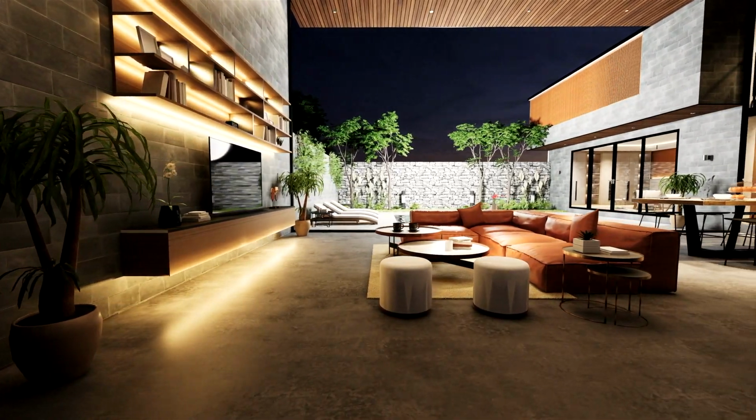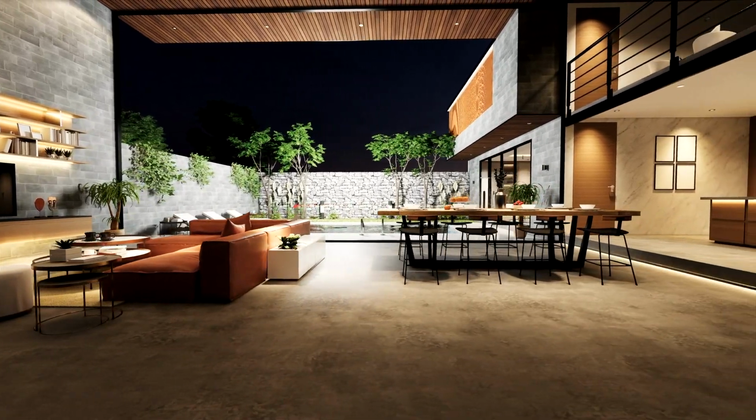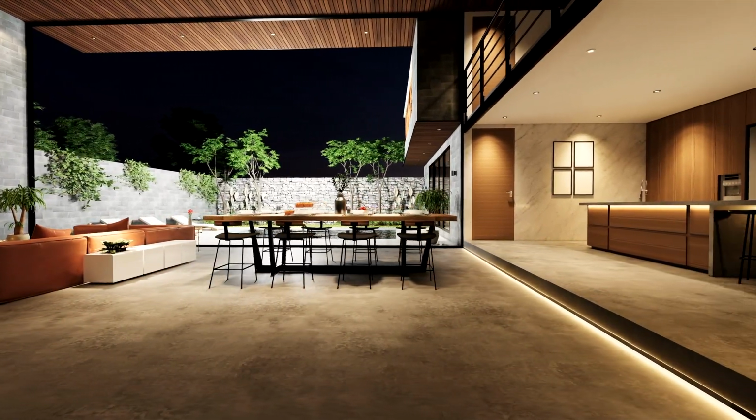Typically, a budget was never set. A curious homeowner simply asked a designer to show them what's possible based on what they want to get done. Anything's possible with the right budget, and if you didn't set one, the homeowner gets a contractor to quote on the plans, and voila, it's way out of reach. Not every designer is going to dig deep and ask you questions to figure out what you ultimately want to achieve and warn you if you can't afford it.